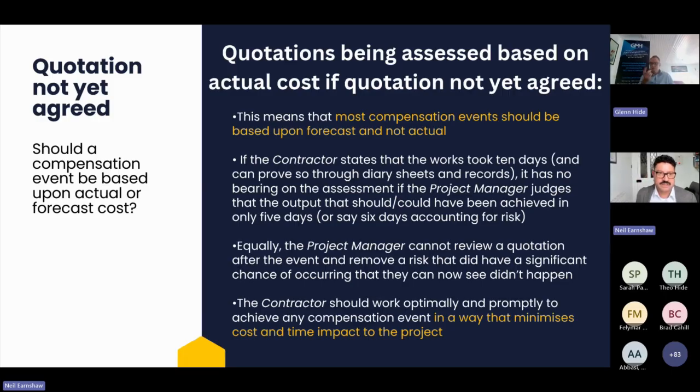Mm-hmm. Great. Yeah, he's quoted, why should I shut my eyes and grope in the dark when the materials are available to show what actual work they did and how much it cost them? Yeah, that was the quote. Yeah, and actually I think what happened in that case is exactly what we were talking about, the cherry picking, where the client didn't respond to the contractor's quotation. They waited until the work had been done. Then they asked for timesheet records to validate the forecast, which incidentally the consultant refused to provide, which is a different issue.